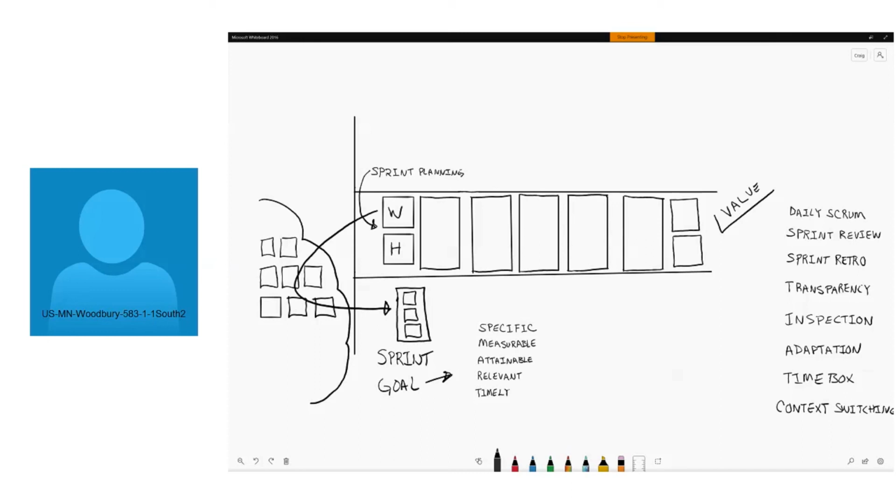Perfectly good approach. Another one would be to order the chicken ahead of time and not pull this from the backlog into the sprint backlog until it's ready and available. The point is that we should not pull it into the sprint backlog unless we're ready to go. We have what we need. The team has the individuals that they need, and we believe we can meet that commitment.